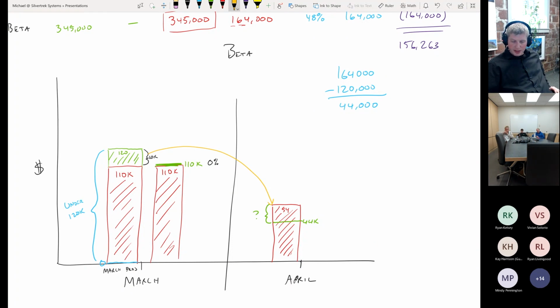So as project managers, it's extremely important that you give us accurate projections, and that if you're going to err on your projections, that you err in the early months on the side of caution. You're being conservative. We would much rather have this go the other way, where in future months we said, we earned too little, please give us more money. But unfortunately, this is the way it often goes.